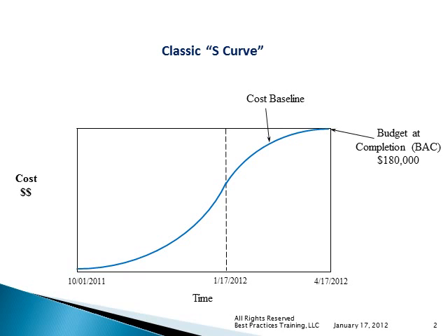So in early October, our costs start out low. We don't have that many people involved in the early design phases. We are not using many tools or equipment or leasing rooms, so our spend rate starts out low. It picks up towards the middle of the project, so in December and January, our spend rate accelerates, and we're spending the most amount of money at that time.